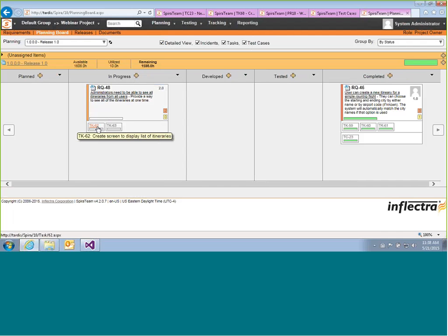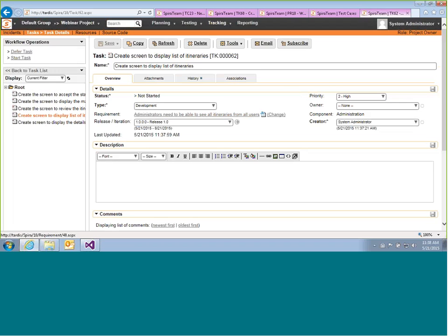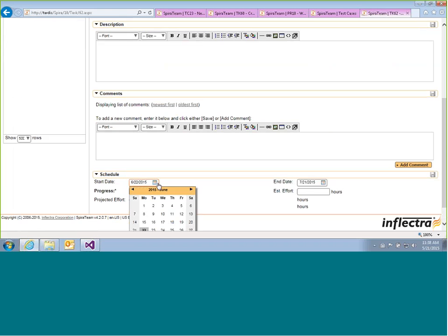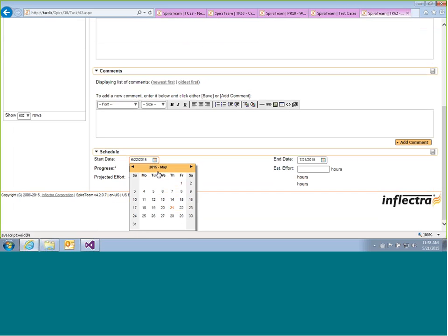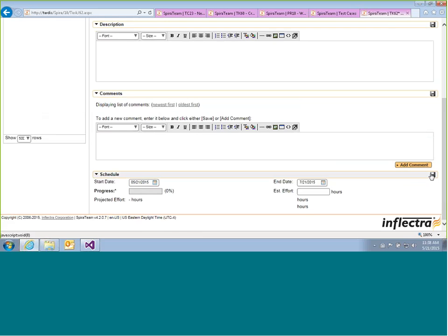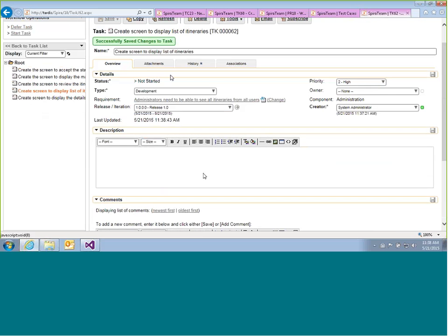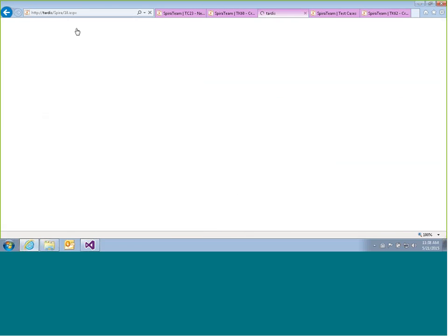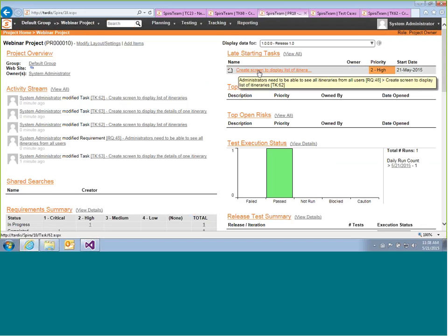So what I'll do is we check the start date of my release is 5/21, which is today. So if I go into my task and I set the start date to be today, 5/21. Hit save. Now if I go back to my home page, it should pop out as a late starting task right there. So that way SpiraTeam is prompting you to find things that are exception cases.